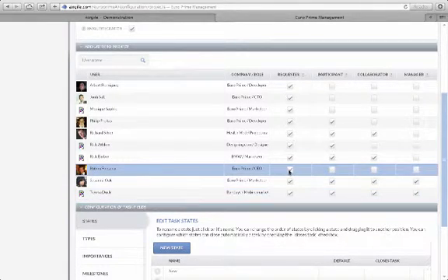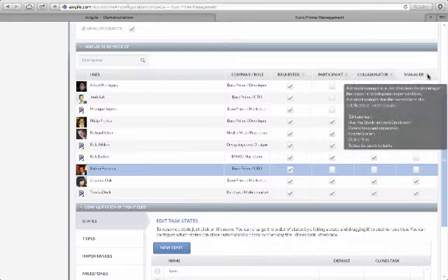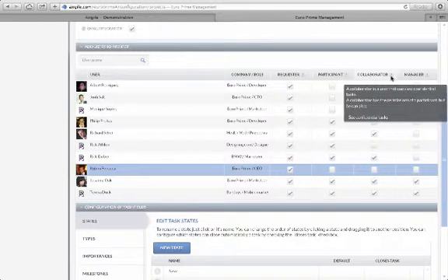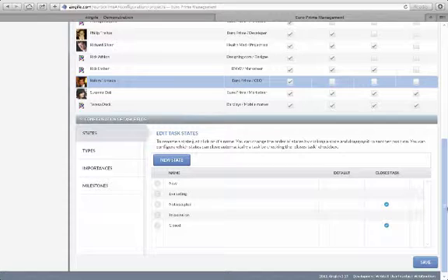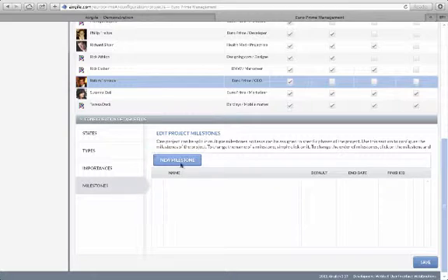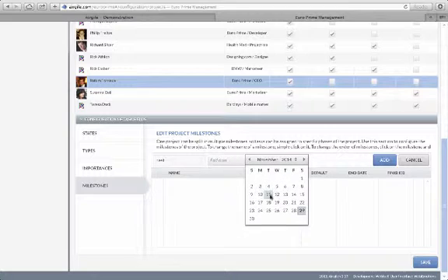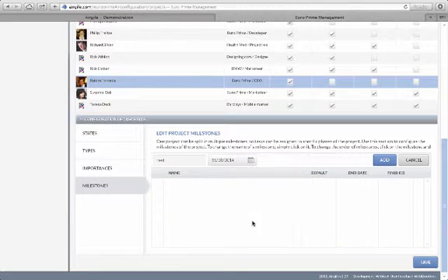If you are not sure about the terms, just hold your mouse over the question marks. Then there will be a detailed explanation about it. At the bottom, we will need to configure some other things. In each project, you can set the space, tabs, and task priority according to your business or industry specifications. One project can be split into multiple milestones, so tasks can be assigned to specific phases of the project. Now we can click Save to save the project configuration.